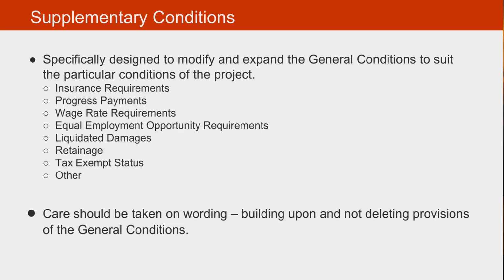You have to be very careful of the wording in the supplementary conditions. The wording is intended to build upon and not delete provisions of the general conditions within the specifications. Oftentimes you may find contradictions between the supplementary conditions and the general conditions, and that is something as a contractor you have to be particularly aware of because they could involve cost.